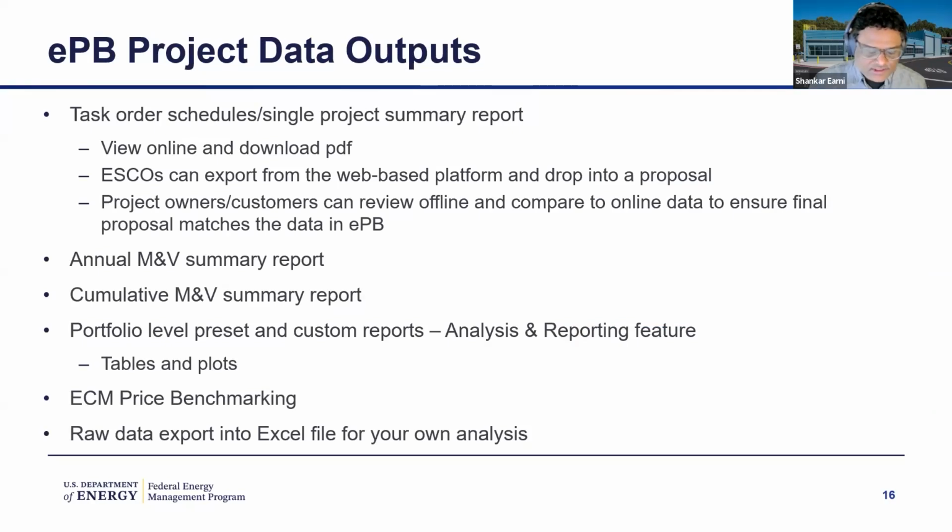So that's the way to ingest data into ePB. Once you ingest the data into the system, the ePB online system can generate the PDFs, your task order schedules or price schedules, that you can include in your proposals. And then the project owners or customers can review these offline versions, offline meaning the ones that are included in your proposal, and compare them to the ones on the system, to make sure that they are in agreement. That's the proposal side of things.